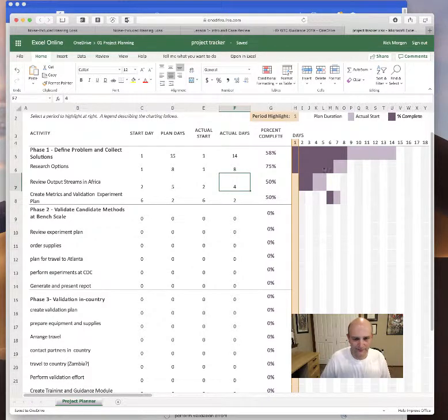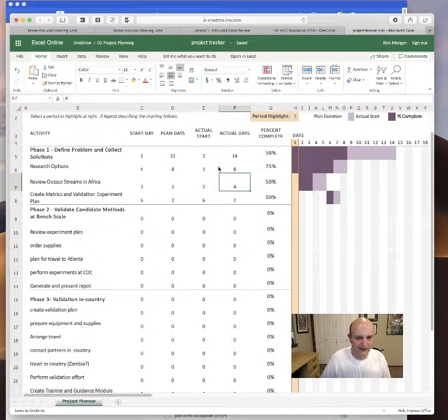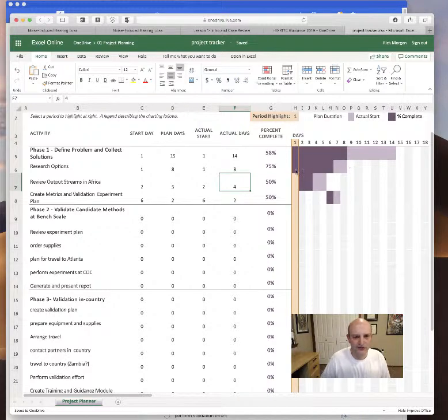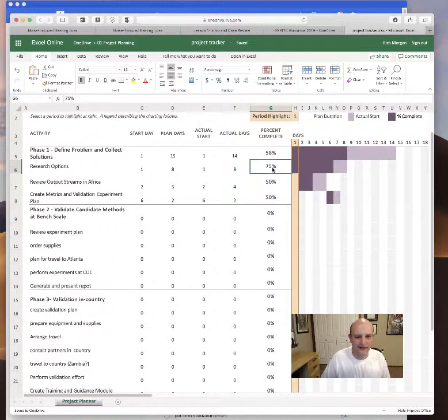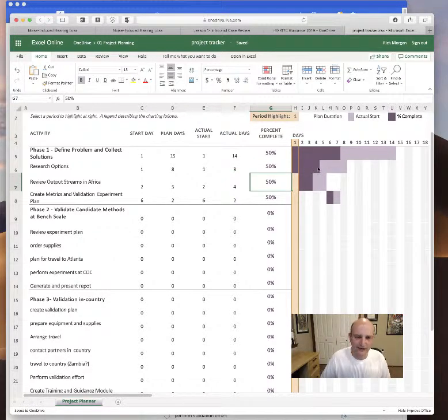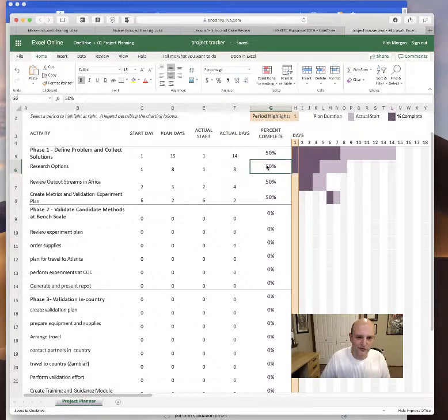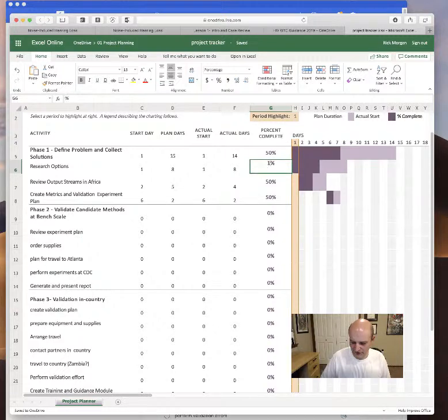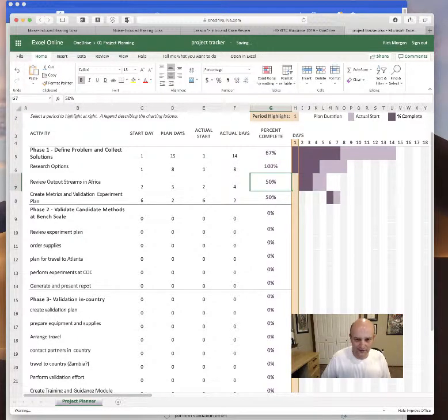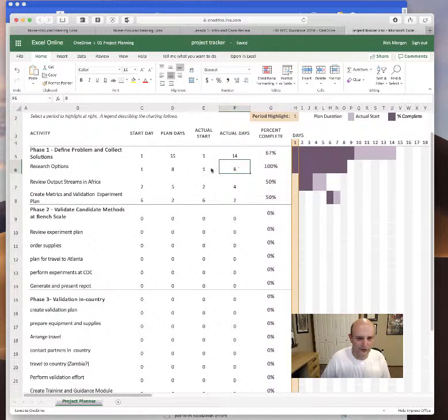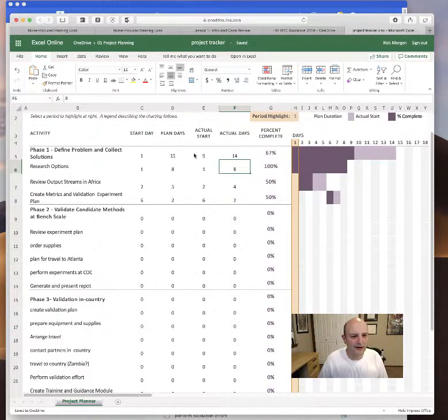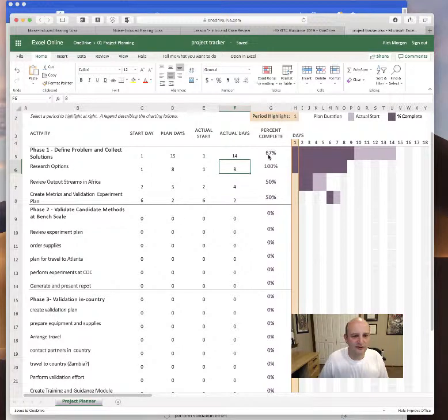It tells you your plan versus how long it actually took. And then if I turn this to 50 percent complete, this little bar drops down. And if I turned it to 100 percent complete, this bar would go to the full. And so this bar up here is the average of these percent complete.